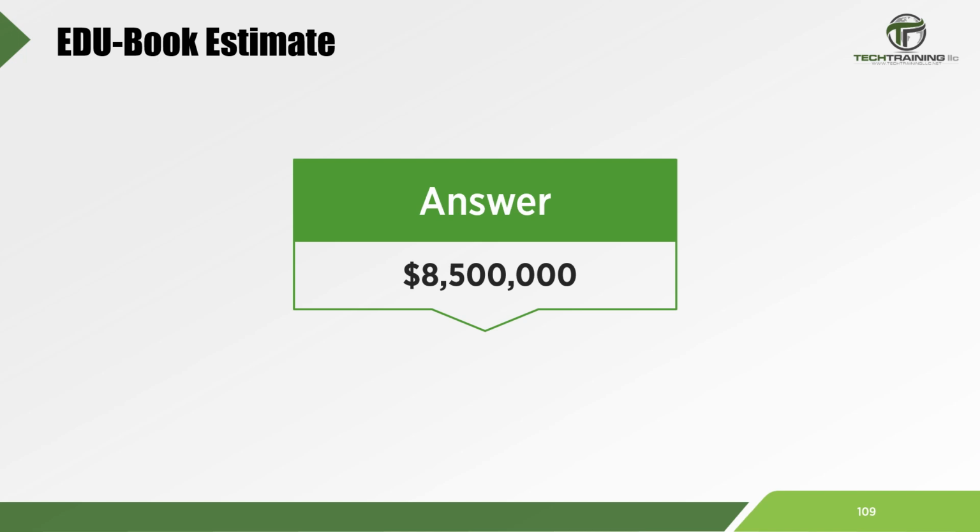$9,775,000. So we've taken a median quality 13,000 square foot library in New York, built in 2016, and given our client a price on a 15,000 square foot library in Texas in the year 2021. Literally in a matter of minutes. This is the importance of historical data.